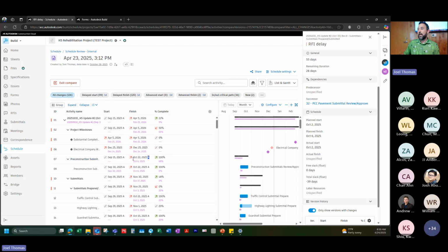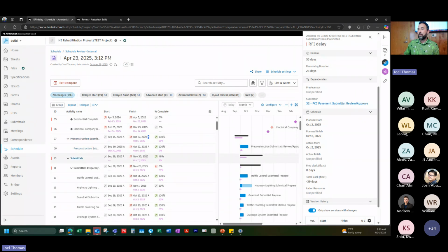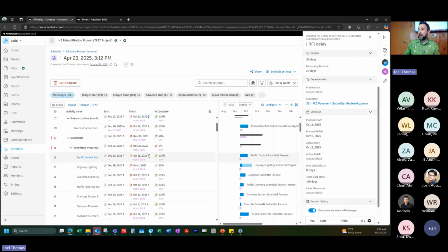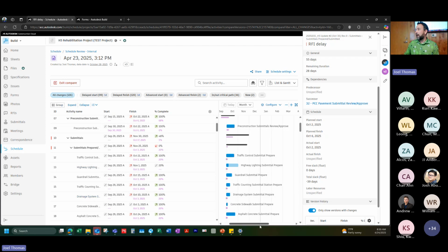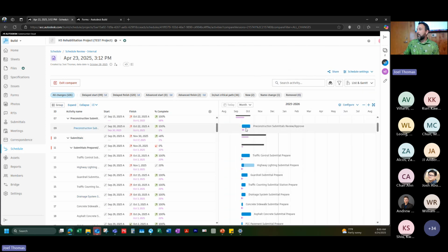When you get your updates, you want to look at these dates and make sure that you more or less agree with when these dates are marked as finished and completed. That's what those A's mean. It's basically telling me, okay, this has started and finished, this has started but hasn't finished. That's a quick way to look at that. And you'll see here too on your Gantt chart on the side, you can see a percent complete. It starts to fill in these boxes, showing me what percentage complete these are at. That's another handy way to look at this.